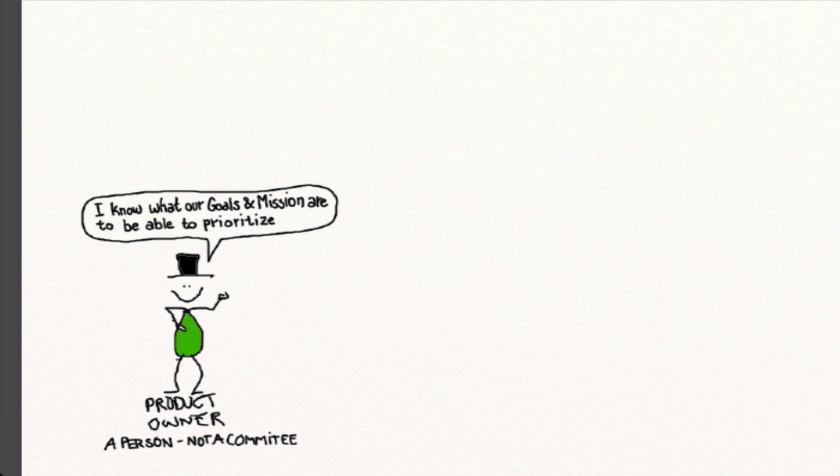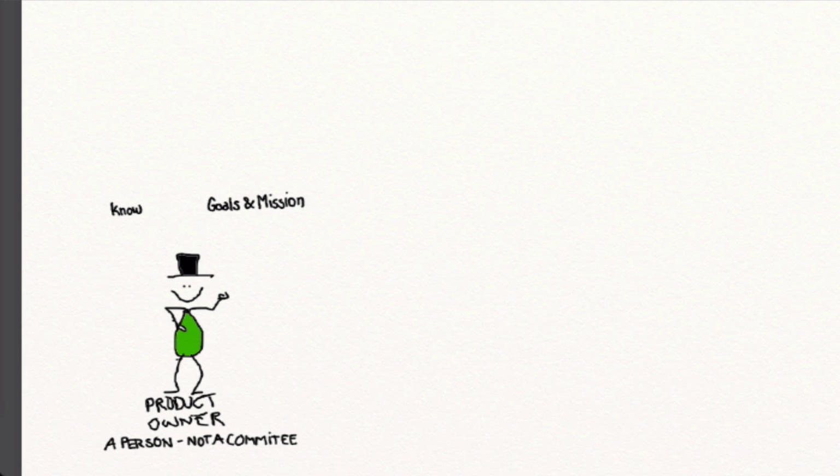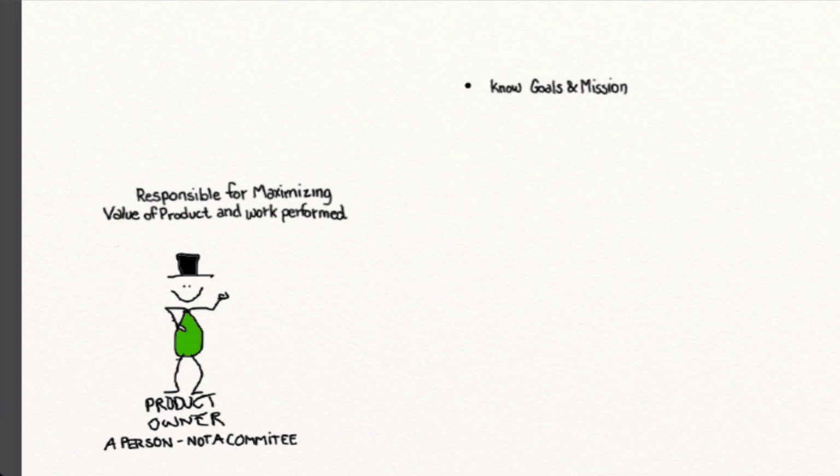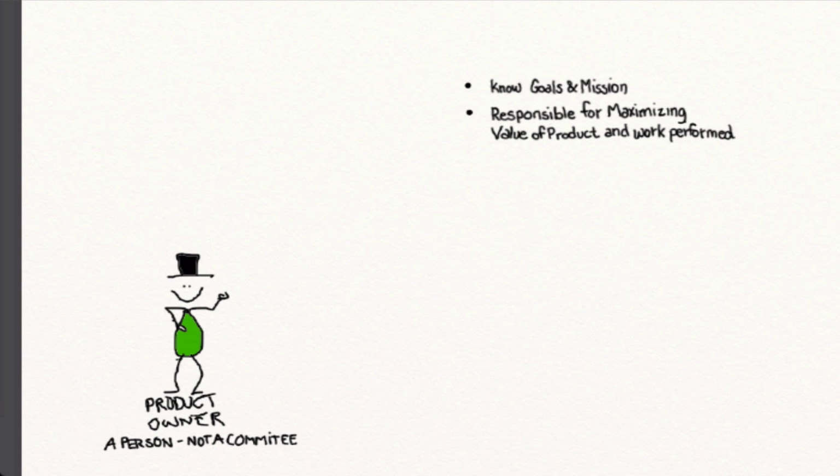Clear knowledge of our goals and mission is a very powerful tool for the product owner to prioritize the different requirements and their order in the product backlog. This knowledge also enables the product owner to reject a specific request for new functionality that falls outside the goals and mission. Outside the product vision, one could say. And even though it's never fun to be told, nope, you can't have that, it enables the one requesting the functionality to get on with their life, instead of waiting indefinitely for functionality that is so low prioritized that it will never be delivered.